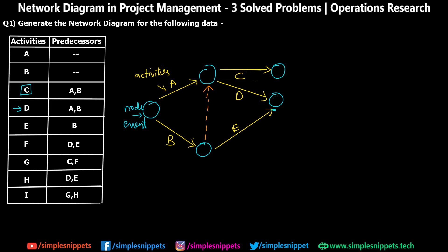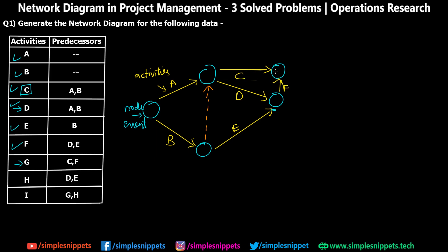Now that D and E are combined at this node, we start F from here, resulting in a different node. Moving to G: G requires C and F together. C reached one node, F reached another. Instead of having them separate, I'll connect F directly to the node where C ended and name it F. Now C and F result in the same node, so G can easily start. So G is drawn, leading to a new node.